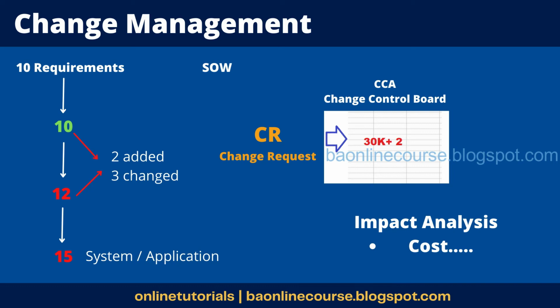But yeah, even if you think logically, this makes sense, right? So rather than just take the requirement as it comes, you're asking him to give a formal request, then you're checking what is the impact of that, and then asking the right people to take the decision, right? So somebody has to approve the budgets. So you're asking that set of people to say, this request came in and this is the cost it would have and timelines impact would be this.